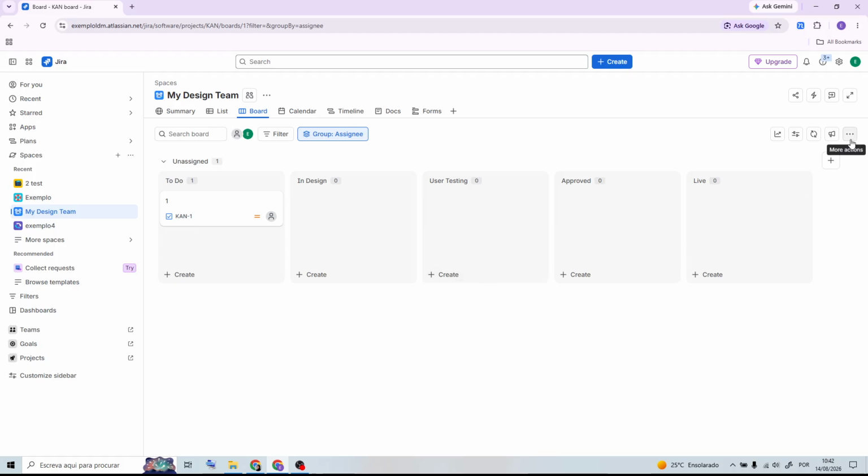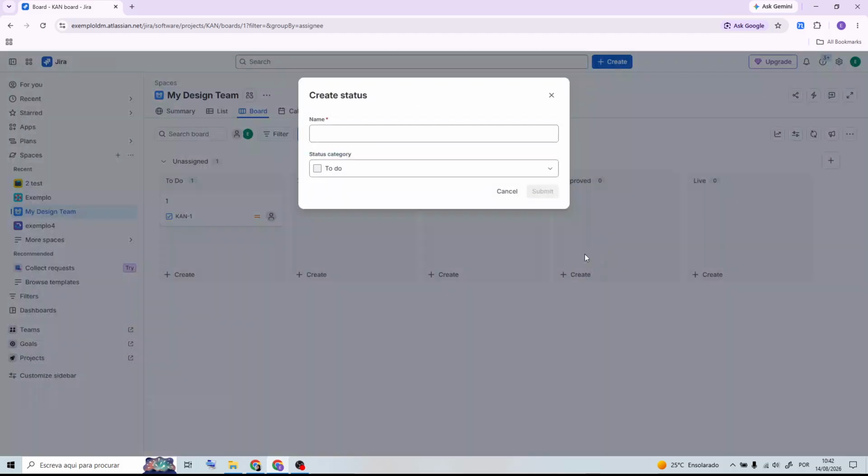Next, create a backlog by adding issues such as stories, tasks, and bugs. Move the issues you want to work on into a sprint and click Start Sprint when you're ready to begin.